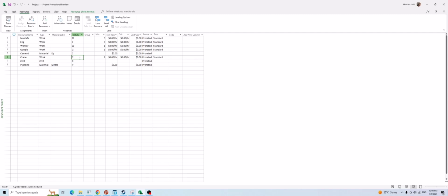Still, you can finish the same scope with 1 person, but definitely it will impact the duration. You can increase the duration and finish the task with 1 person, or reduce the duration of the task with 5 people, because they are working together, they help each other, and the working hours per day increase when you have 5 resources, and they can finish the task faster, right?